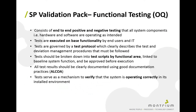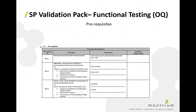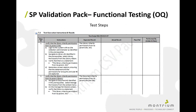Tests serve as a mechanism to verify that the system is operating correctly in its installed environment. This is an example of an OQ test script for testing SharePoint against 21 CFR Part 11 requirements. First we define prerequisites and any values to be used for testing. Then we have the different test steps followed by the person executing the test — they go through each step, look at the expected results, verify that's what they have, record the actual result especially if different, and indicate whether each step passed or failed. They initial and date to make it attributable. These could also be executed electronically.